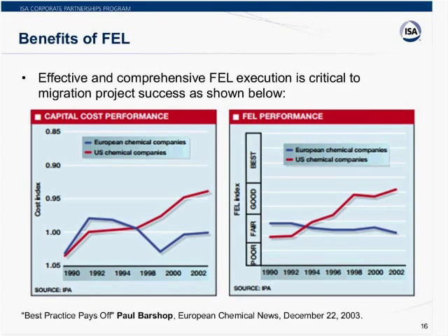And then if you look at the graph on the left, it shows the cost index, a comparative cost index for a similar class of plant. As you can see, the folks who really didn't improve FEL stayed normalized with their peers. Those that invested properly in time and effort to do FEL saw a favorable cost index, about a 7% benefit for the installed cost of the plant. So it can help your business be more competitive.